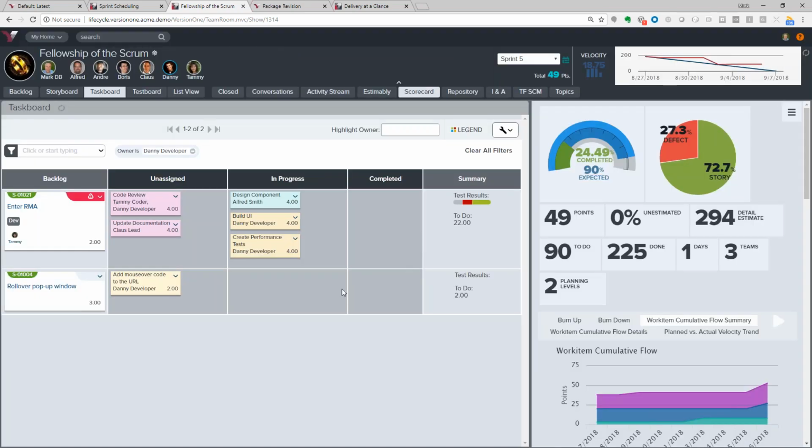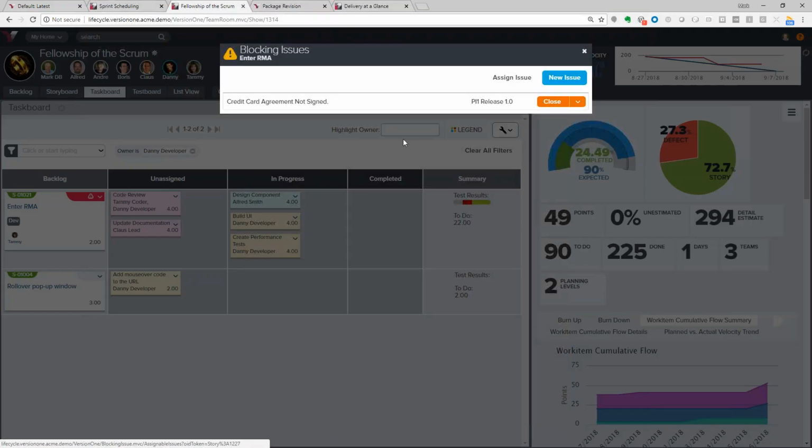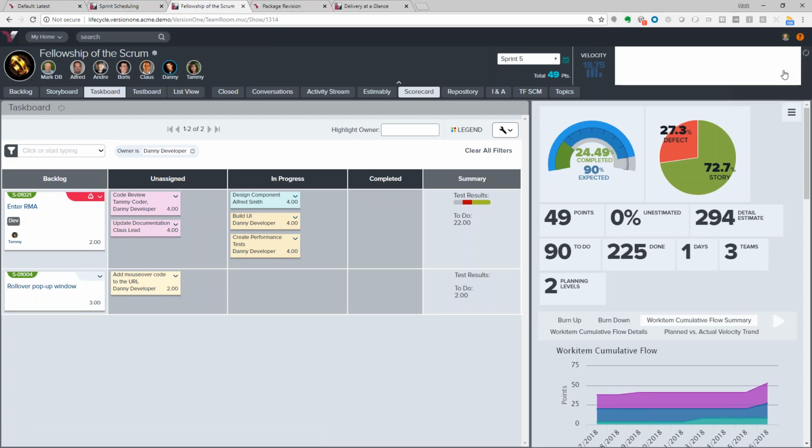With my last Scrum team, when I was a Scrum Master, we tried to get through this conversation and have this daily stand-up in 7.5 minutes, because that gave me 7.5 minutes then to deal with things like these impediments and these blockers. We can see that there's a blocking issue on this story. We need to make sure that we can address that as a team so that doesn't get in our way of having our burn down go down to 0 and track all of that work that we want to see. So this is some of the things that you can see at a team level.